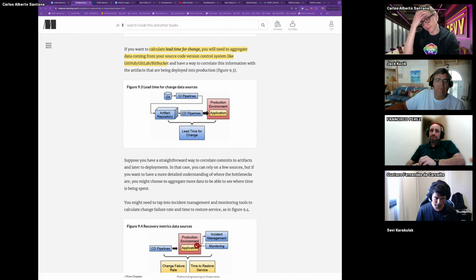But imagine yourself working very hard over the weekend. We ship on Tuesdays, and then on Monday you send your PR, and your coworker is busy on something else. You ask your coworker to merge the PR, and he's busy on Monday, so he does it on Tuesday morning, and then it gets merged, and then the image is created. It's Tuesday at 1 p.m. It's too late. You missed the boat, so you have to wait a full week until the next Tuesday because they're already shipping to production. So that gives you a full cycle of lead time to change.